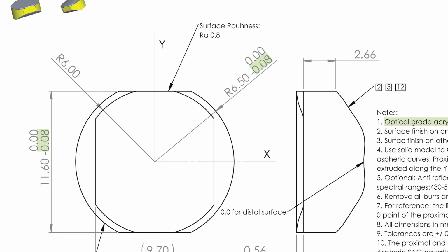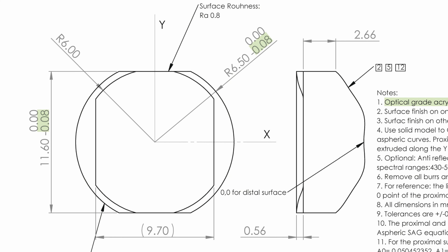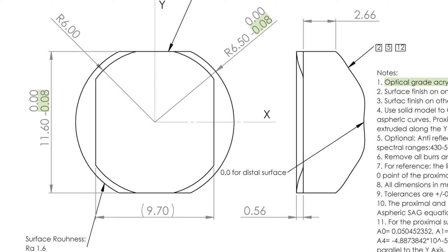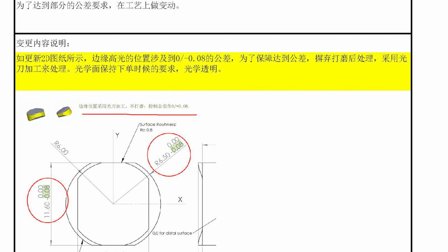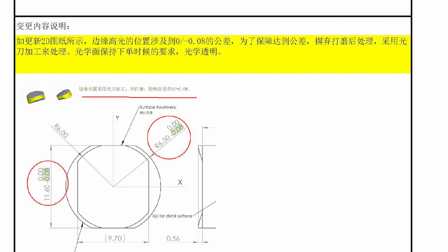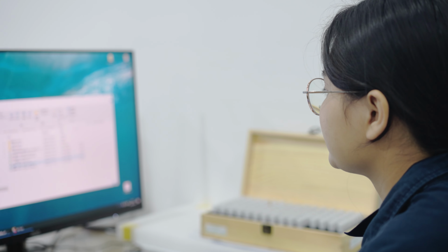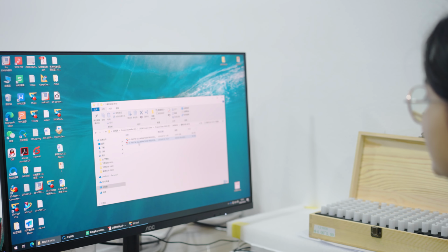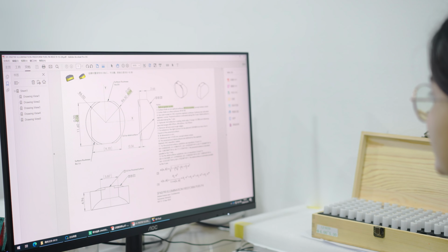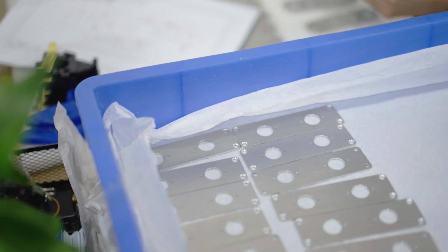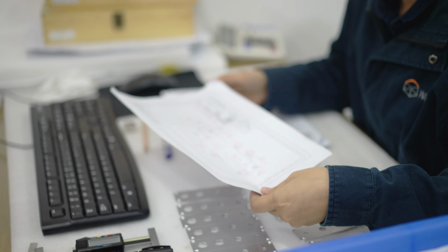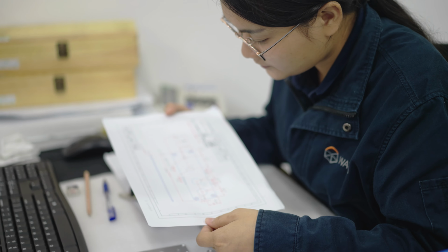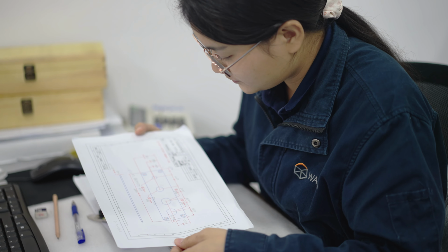This was our communication process with the customer, with important information highlighted. After the proposal was confirmed, the project manager updated the drawing and added Chinese comments to indicate where manual polishing was not possible and how to conduct inspections. We then updated the drawing following the process mentioned above, and all departments printed the new drawing as required. The quality control system also updated the inspection drawing.